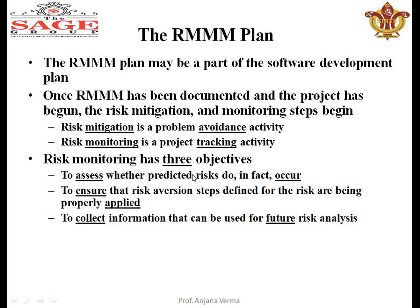During monitoring, three objectives should be there: first, ensure that predicted risks do not occur; second, ensure how we are avoiding those risks; and third, collect information about risks — what caused them, what happened — and use that information in the future during risk analysis.